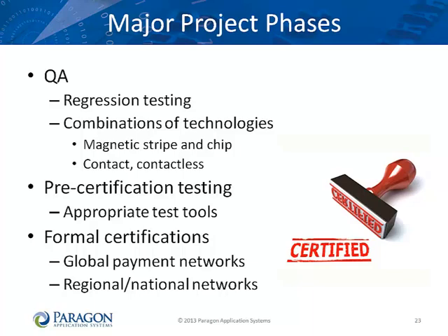QA must be done prior to formal certification with the global payment networks because you need to certify exactly what you put into production. Formal certifications with the global payment networks are expensive and time-consuming. You want to make sure you can pass these certifications on the first attempt.